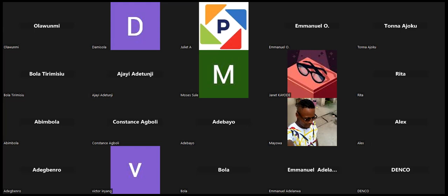Another thing you should have really noted was when they were ready for the main retro, she timed them. It's a process. After the games, usually you give everybody 10 minutes to populate the board, or 15 minutes, depending. For me, I always think 15 minutes is too long. You can just give your team 10 minutes, 5 minutes into the time, 5 minutes more, guys, a minute into the time. You also heard her talking about music.